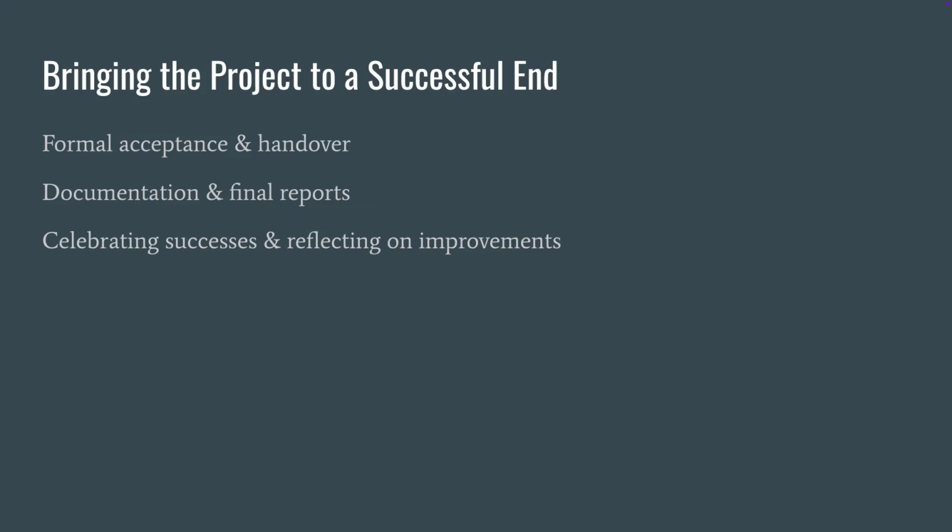Documentation and final report step. This step ensures all project documentation such as design documents, user guides, and contract-related papers is centralized and easily accessible. Final reports may include financial summaries, performance metrics, and a detailed account of project successes and challenges.